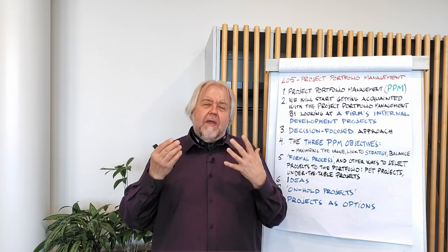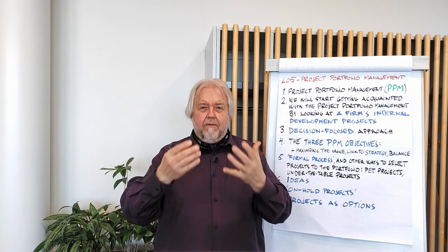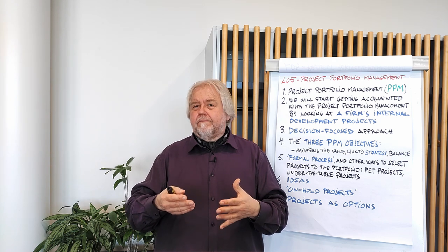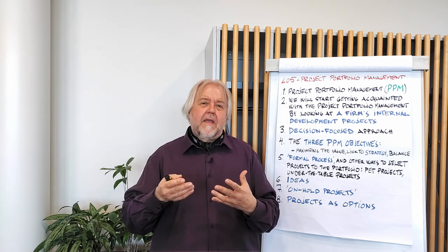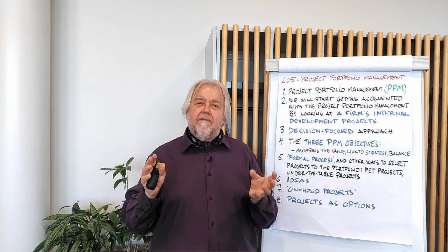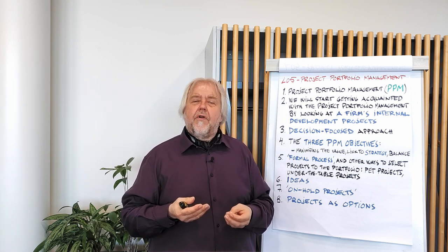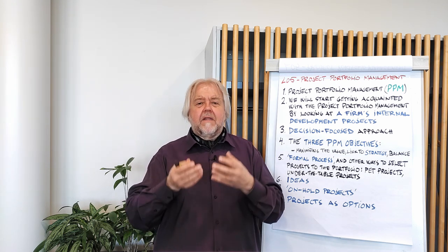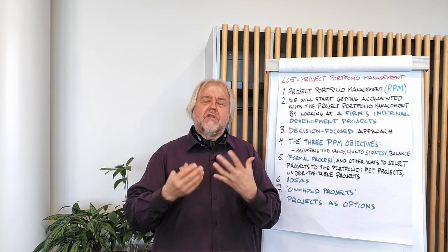Then, one important thing to emphasize is that we can use written or verbal descriptions of the characteristics of projects that we are evaluating. And we can do that by using question lists. We can have pre-prepared question lists where, for example, if we have new product development projects, we can have product or technology related questions. For example, do we have the competence or capability to develop a product using this kind of technology? What are the uncertainties related to technical issues in development?